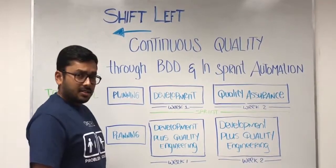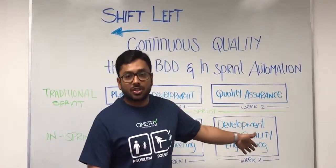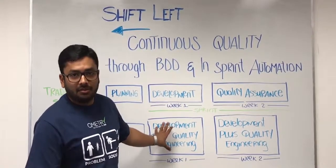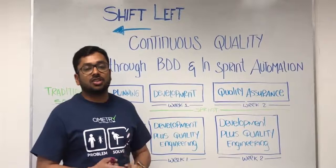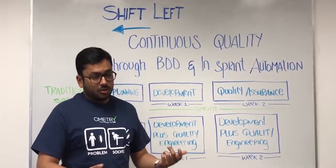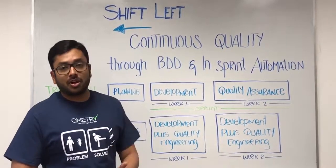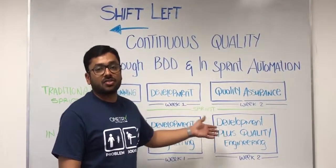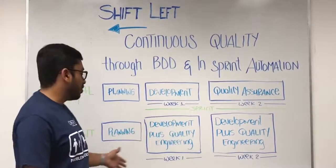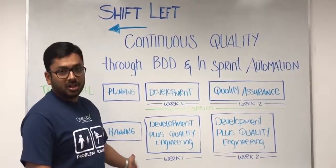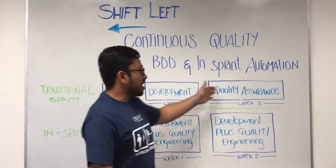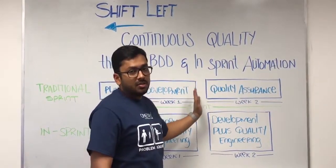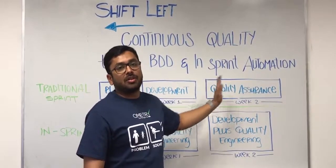Once the planning is done, say again we have two-week sprints. Here you can see we are not only doing the development activities, but the quality engineering team — which includes the manual testing team as well as the automation team — is working on QA activities right from day one of the sprint, rather than the staggered approach of the traditional sprint where the QA sprint is staggered with the development sprint by one week.